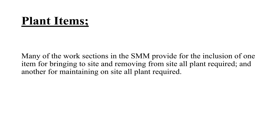Plant items are the costs involved when dealing with plant. There is a cost for carrying the plant to the site and taking the plant out of the site. Another cost is maintaining the plant on site. All these costs are added as a sum — as an item in the bill of quantity. So they are called plant items.